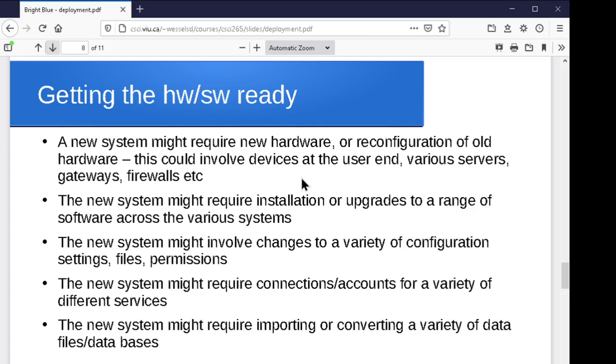There are lots of things that might be involved in a process like this. So you want to spend the time beforehand to document all of the steps that have to happen, to organize them, maybe to do some trial runs as best you can, right? To have scripts to automate this as much as possible so that you don't forget a step when the install actually happens. It can be a little chaotic during the install days.